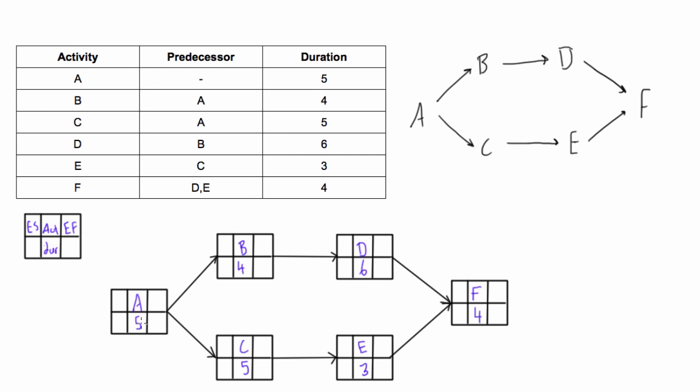A is at the beginning of the project—it has no predecessor, so we begin that at zero. This is the beginning of day one, whereas the number one would be the end of day one. Activity A is five days long, so zero plus five means activity A will end at the end of day five if there's been no delays. Now, to find the early start of succeeding activities...